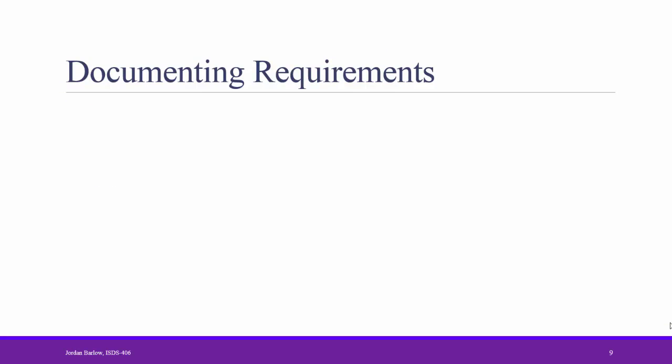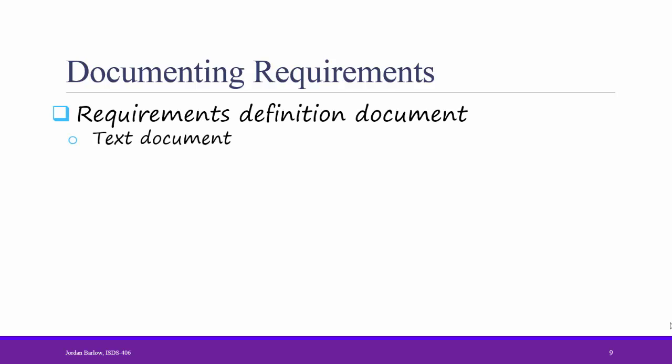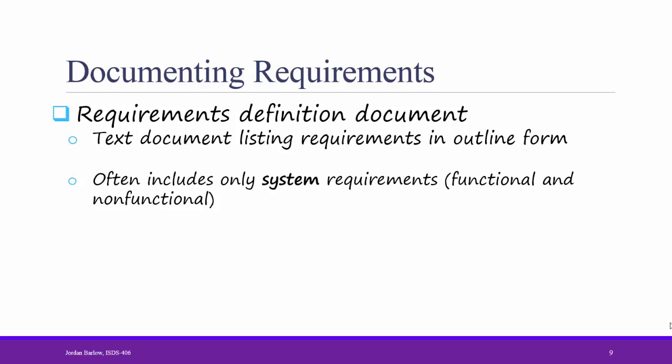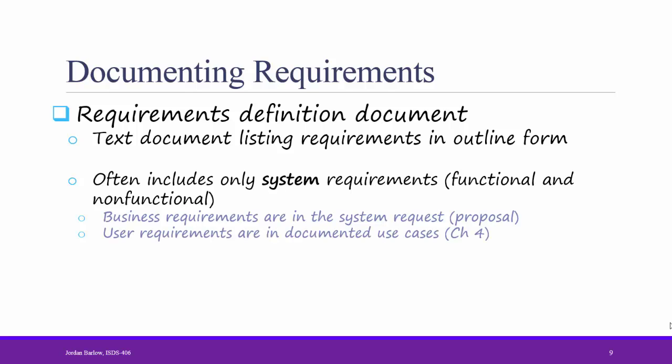Now that we understand what system requirements are and the various categories of them, let's talk about how we document them. The main place to document system requirements is in a document called the Requirements Definition Document. This is a text document that lists requirements in outline form. It often includes only system requirements — functional and non-functional. The business requirements are in the system request that we completed earlier, and the user requirements are documented through use cases, which we'll talk about next week. The Requirements Definition Document becomes a central place where designers, analysts, programmers, users, or anybody else can check to make sure that we're all on the same page about what the system should be able to do for us and what characteristics our system has.